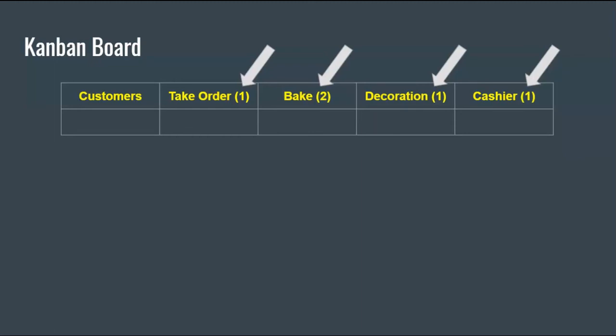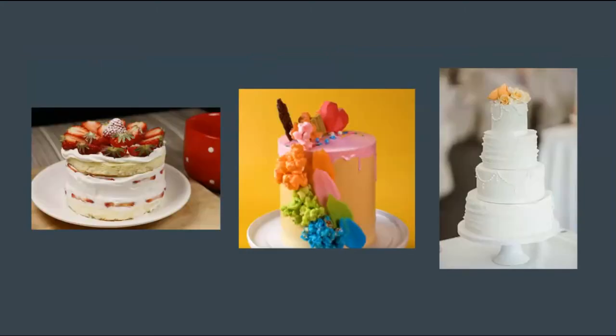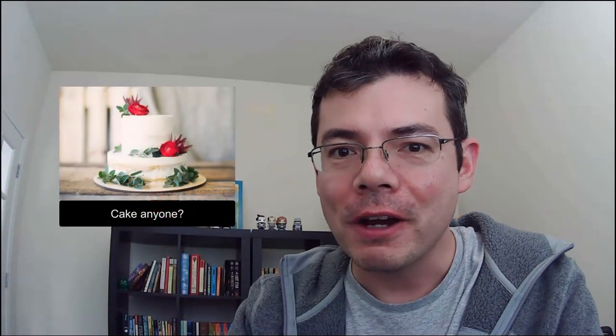I'll talk about Kanban in more detail another time. You could also wonder, what if someone wants a large cake or a small cake? In that case, a large cake would be like three regular ones worth of work, a medium cake would be like two cakes worth of work, and so on. I know I talked about a bakery instead of a software development team, but I think you'll agree that there are many parallels in both instances, and that the Theory of Constraints can be used successfully in both.